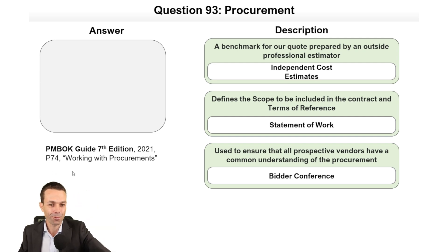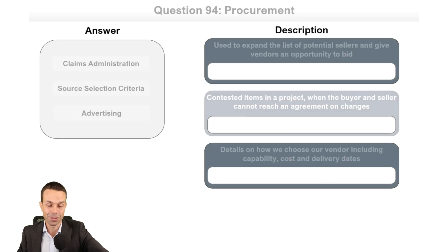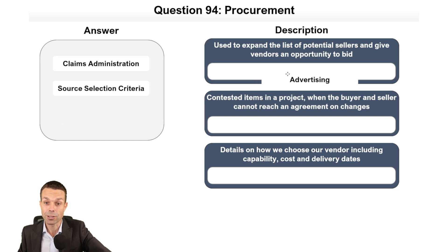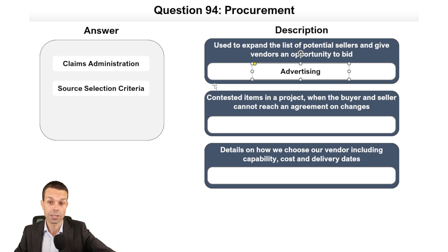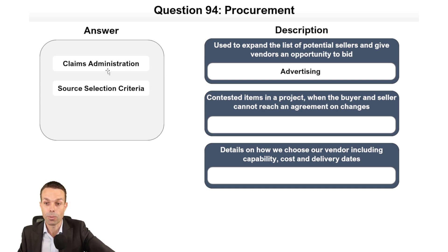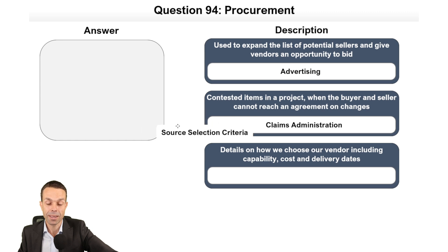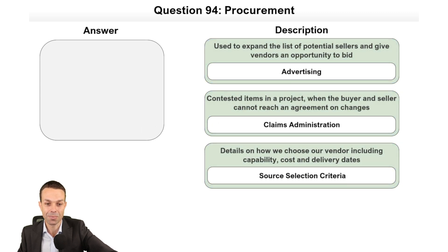More procurements: to expand the list of potential sellers, especially for government contracts, we advertise the opportunity so all vendors have a chance to bid. Contested items where the buyer and seller can't agree on changes are handled through claims administration. Details on how we choose our vendor including capability are captured in our source selection criteria. All confirmed correct.